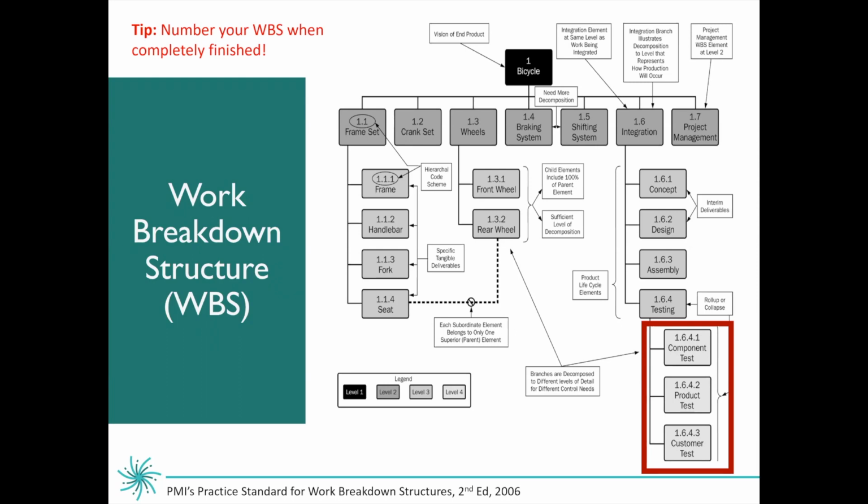I can tell you that will save you a lot of time and effort if you wait until the very end to number. Whenever I'm creating one of these in the real world, say you get all of your stakeholders or project team members into a room and you're working on the work breakdown structure together, I like to use something very simple. I often will get sticky notes and start at level 1, go down to level 2, go down to level 3, and so forth. That makes it pretty easy so that you can move the sticky notes around as needed.